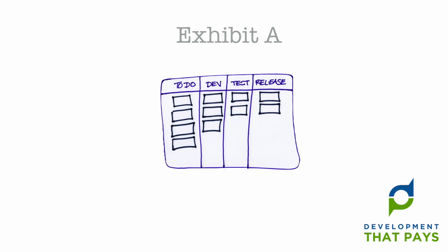First of all, Scrum or Kanban? Well, the cards are quite evenly spread, so it's likely to be a Kanban board. There are not too many cards on the board, so the work in progress here is nice and low. I'd be happy to give this board a clean bill of health.